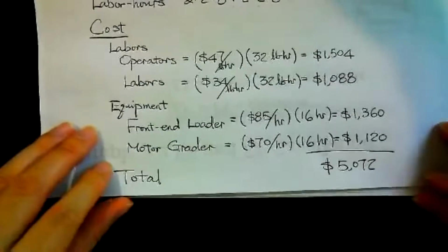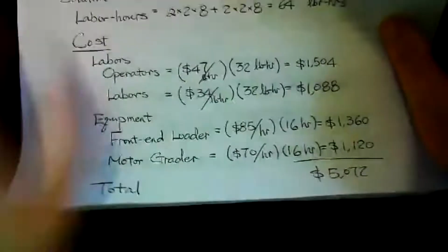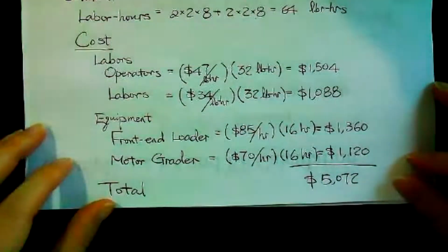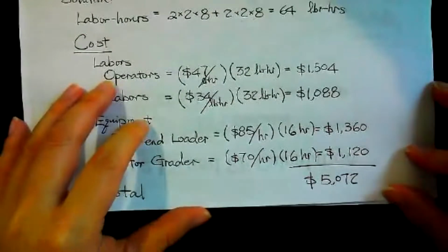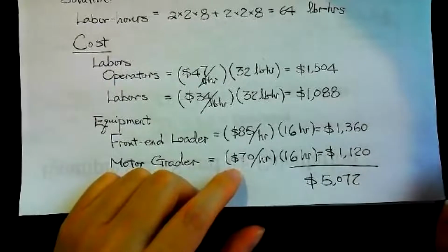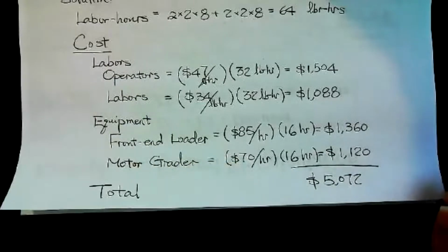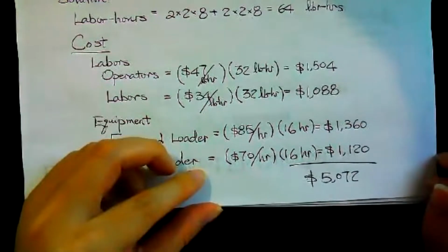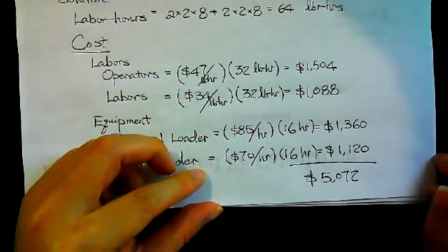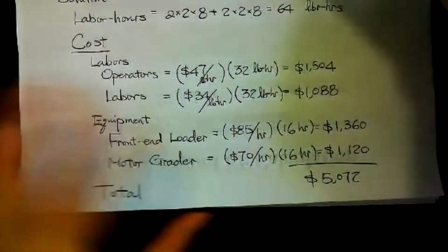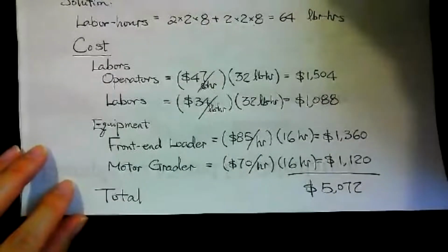Okay, this is the WBS structure Primavera used. Very simple calculation. Just use the unit price, the unit rental for equipment and for labor, times the total hours. Resource times the unit price gives you the cost. Okay, this is very simple.